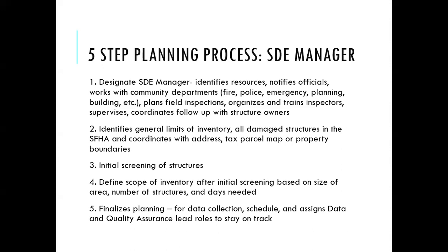So you're going to need that property data to be able to do assessments. And then you do the initial screening of structures, basically call this the windshield inspection. So you drive through the areas of damage, of course, once it's safe to do so, and you just kind of get a feel for what levels of damage you're seeing. Is it just lightly damaged, or are there structures that are obviously substantially damaged?